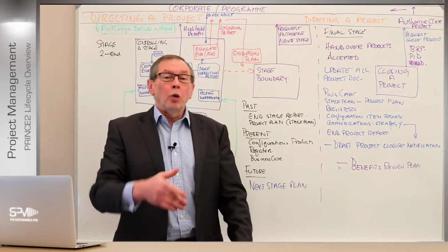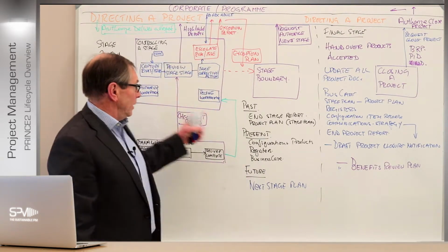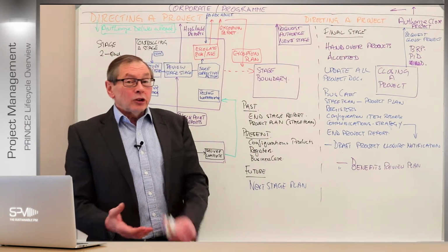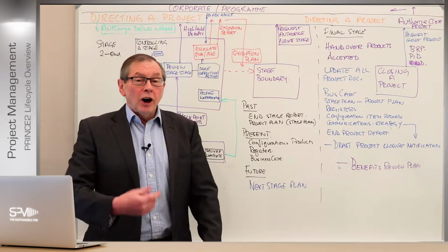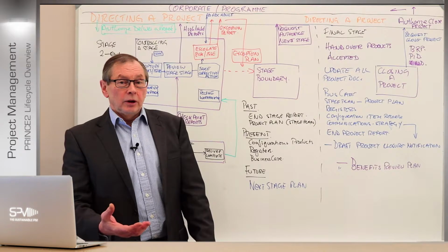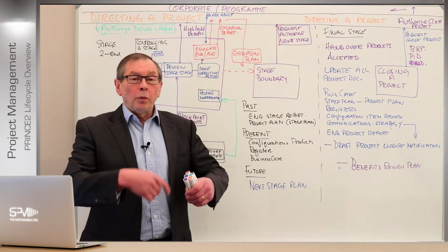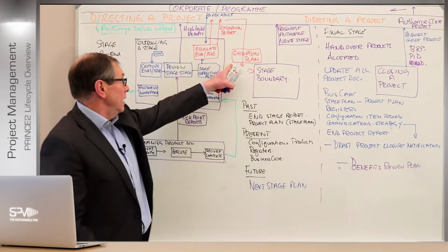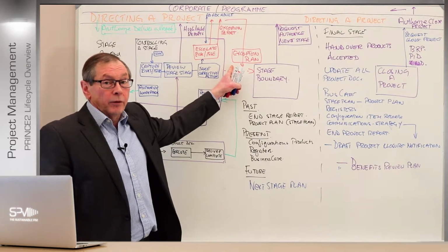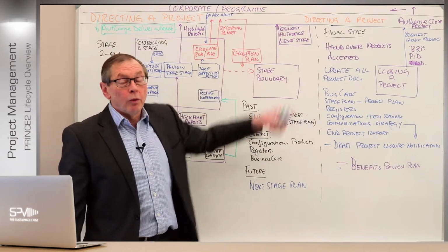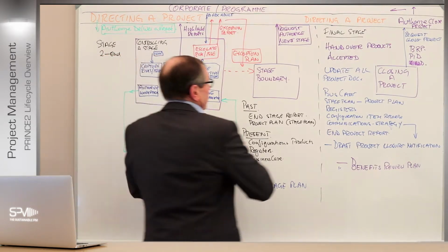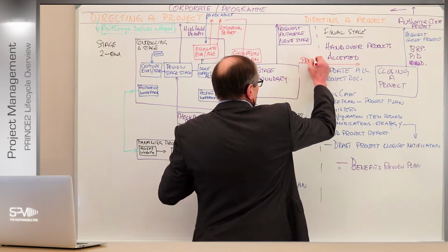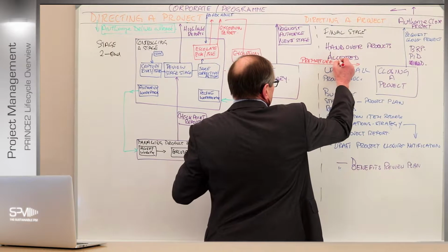Now, that's all well and good when things run normally. Like here, when things run normally within a stage, we can get to the stage boundary and shut it off. Now, sometimes that doesn't always happen. Sometimes there comes an authority halfway through the project, we're closing the project down. Or at this particular point, it's gone beyond the bounds of comfort zones, things have happened, issues have occurred, and we can't recover from those issues. Like here, it might be that the exception plan will be to shut the project down for whatever reason, right? At some point, there will be a request for a premature closure. So I'm going to put a big red line here and say premature closure.